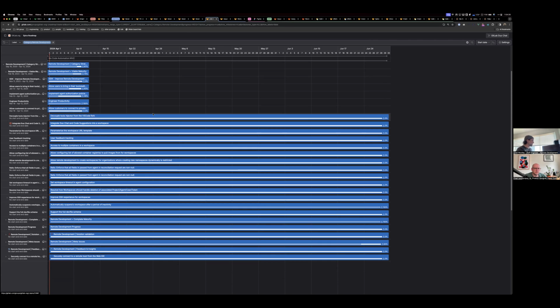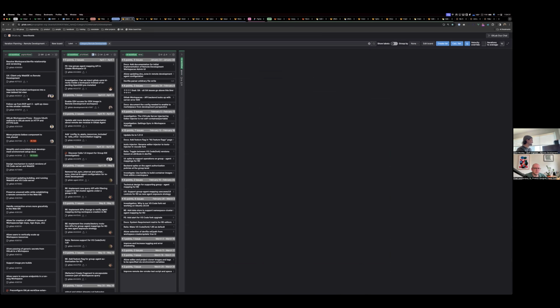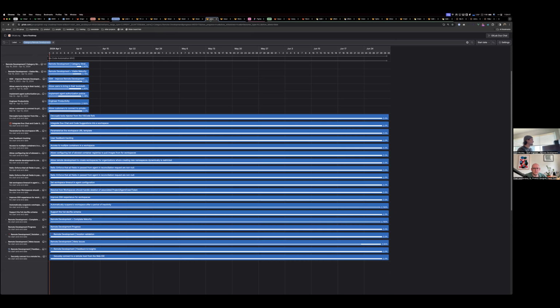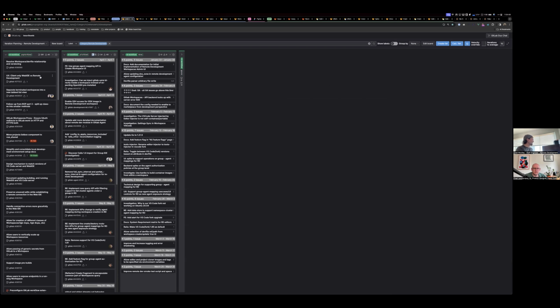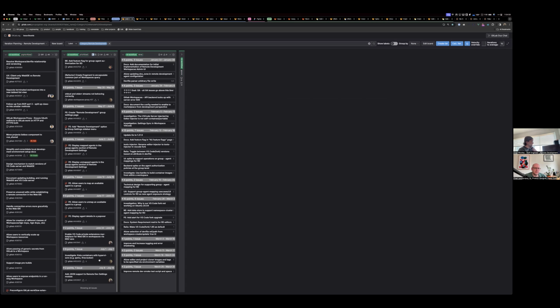Assume everything that we have is a 2.5, or maybe in the backlog we just guess and say, all right, everything is like an 8 or a 13 if we think it's going to be big, and it'll get broken down in refinement, and then that would possibly make this roadmap view more useful. But again, that's an anti-pattern because you're trying to predict the future again, rather than letting the past tell you what it's going to be for everything that is actually refined, and therefore will be good data flowing into the calculation.